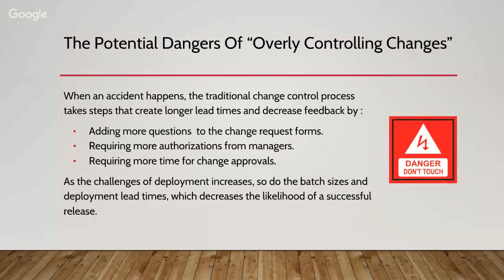One of the dangers of overly controlling changes is that it can create longer lead time. It adds more questions that need to be fulfilled for the change request form. It requires more authorization from managers, which means more time. As the challenges increase, so do the batch sizes and deployment time. It decreases the likelihood of a successful release.